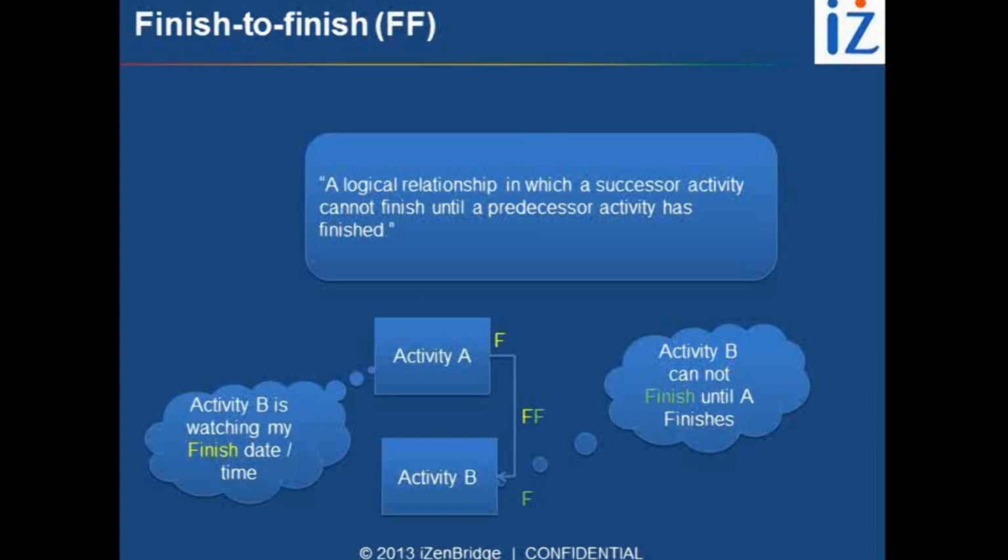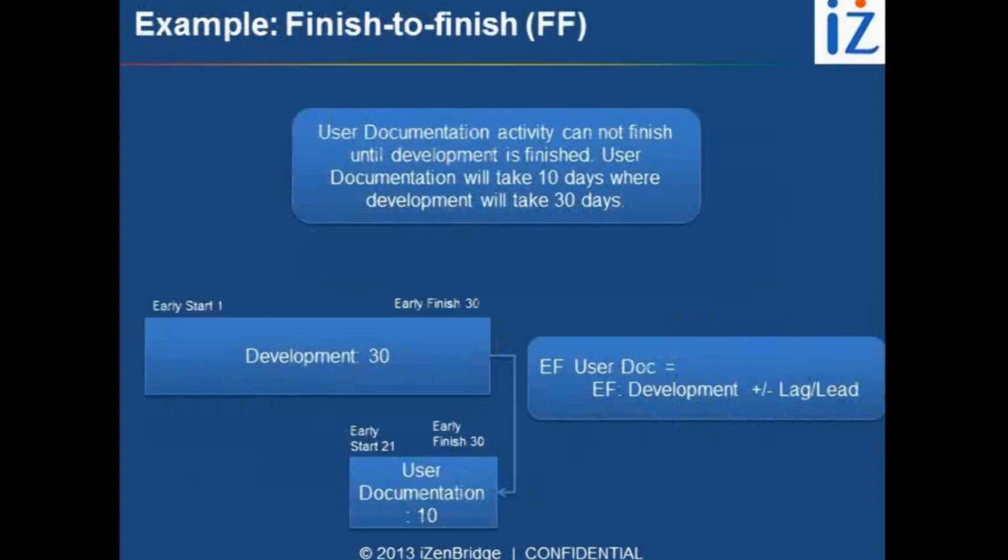So activity B cannot finish till the time activity A is finished, but it does not mean that as activity A finishes, B also has to finish. I am again emphasizing this point: it is putting a condition for finishing, but it is not mandating that I must finish my activity B on the same day as activity A is finishing. So this is another concept we should keep in mind while attempting questions.